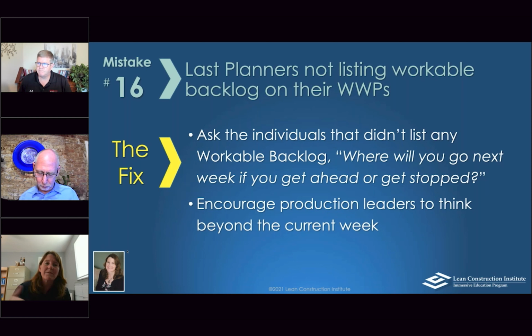And then finally, we want to make sure people are starting to think beyond the week that we're in right now. What are some of my workable backlog items that I could do next week? What are these things that aren't critical but are going to need to be done? And then that's going to help our flow and help us to actually finish sooner, because those are the items that usually get left till the end because they're not the critical ones.